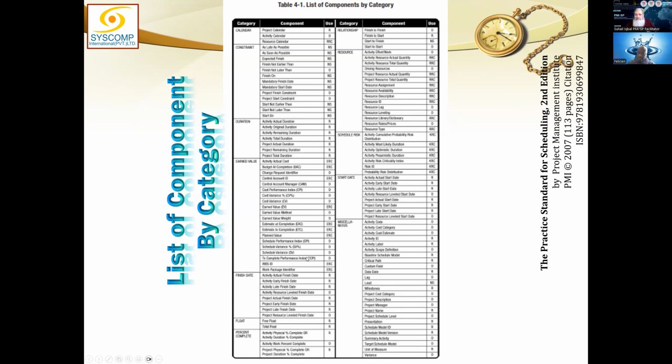You see, if you complete optional items, the optional items are not useless. Optional items are good because you get a point for optional items. You don't get a point for not scored items. Not scored items are useless. Optional items give you an extra point. Required items are required to pass the schedule test, right?